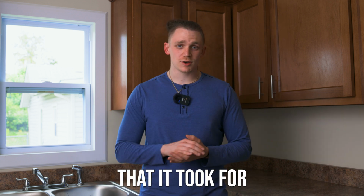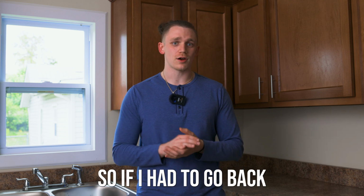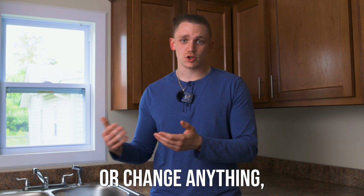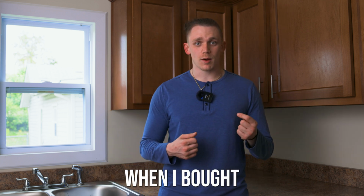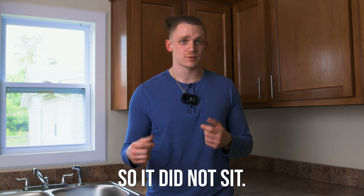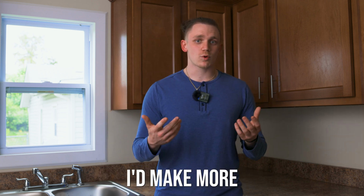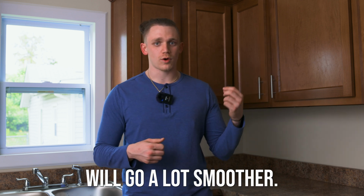The timeline that it took for this project was 13 months, entirely way too long. So if I had to go back and fix or change anything, I would make sure that when I bought this property that I had a contractor on the job site day one to start the rehab, so it did not sit. Would I buy this deal again? I would definitely buy this deal again. I would make more money on it, and the rehab process would go a lot smoother.